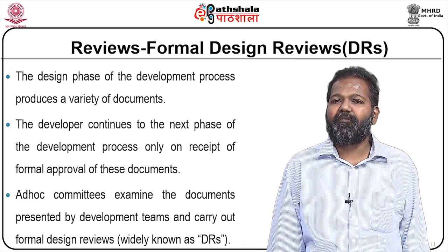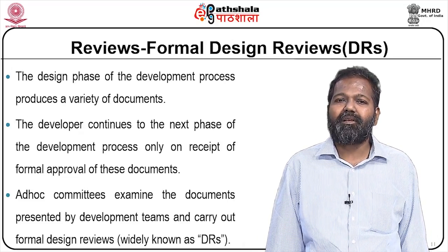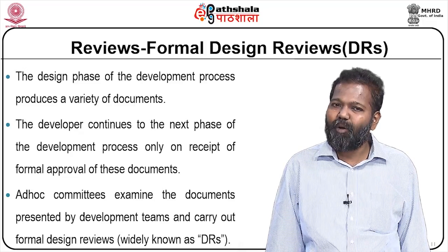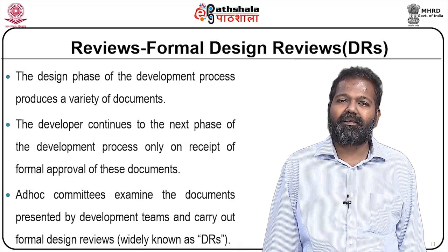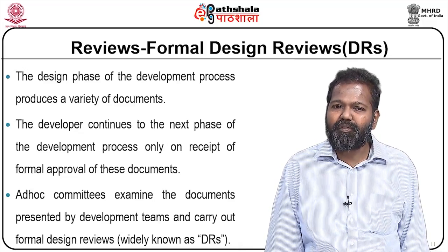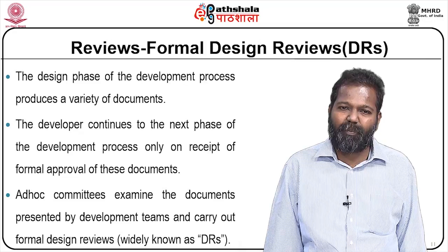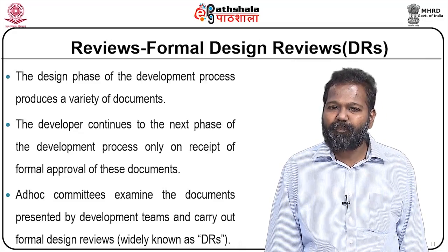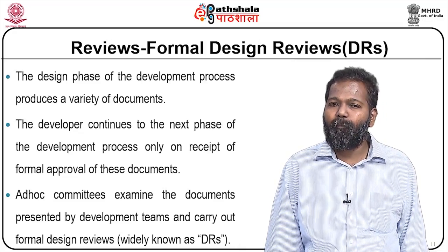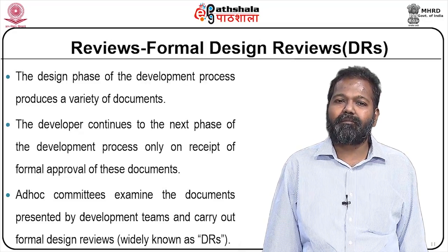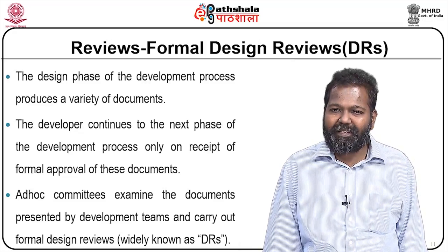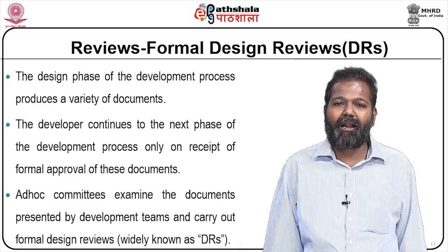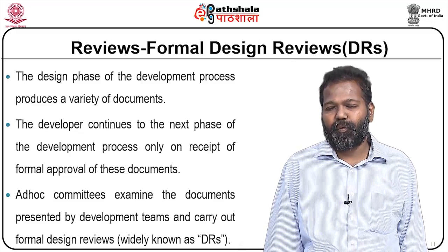Reviews, formal design reviews. The design phase of the development process produces a variety of documents. The developer continues to the next phase of the development process only on receipt of formal approval of these documents. Ad hoc committees examine the documents presented by the development teams and carry out formal design reviews.